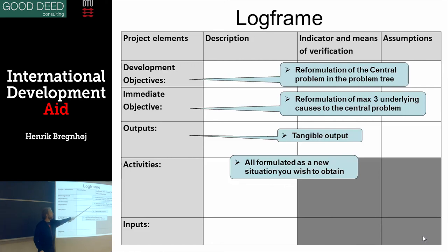Then you could have some underlying causes here, things that you want to solve, and that should be maximum three immediate objectives formulated. This is general for log frame matrices in some dialects, you could say, but also for your exercise here, your application here.